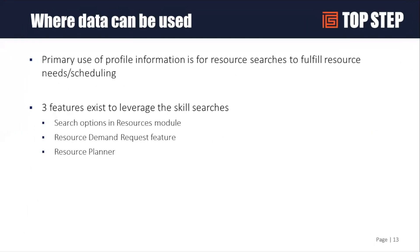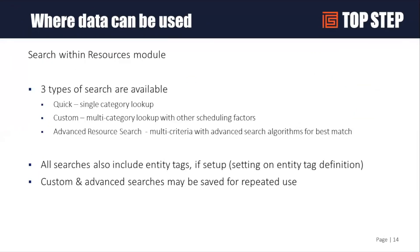Once you have a profile, where can you use it? The main area is searching for somebody. There are three different types of searches in OpenAir in the Resource module: the quick search, which gives you the ability to look up something by skill category; the custom search, which allows you to combine categories, availability, and other factors; and the advanced resource search, which is similar to custom but has more functionality and uses a different search algorithm to find the best match. The advanced search is what we tend to advertise most with customers.